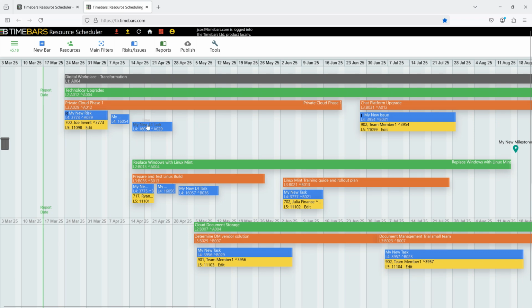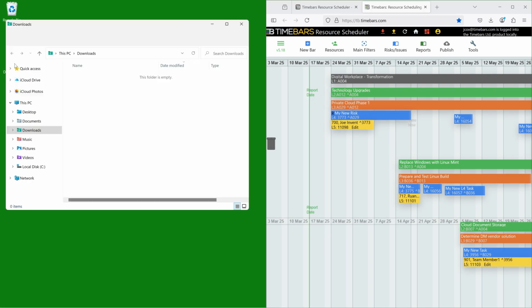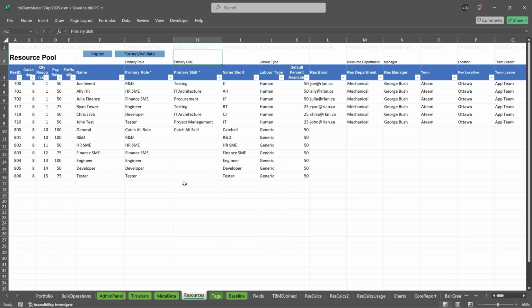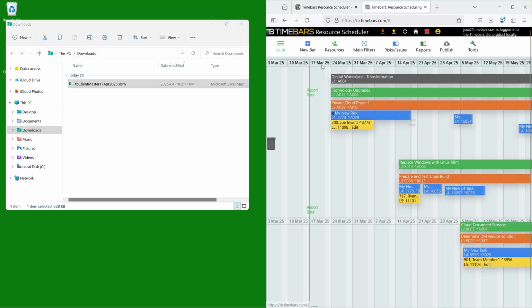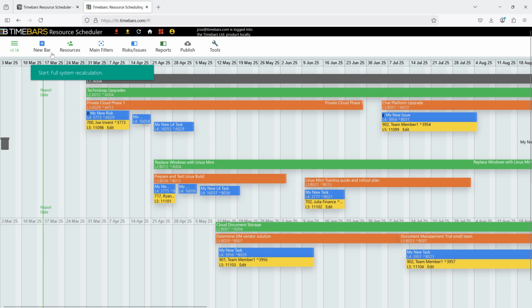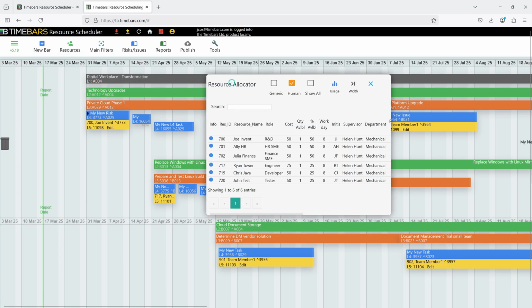Yeah, avoid the weeds. And right from the start, Timebars seems interesting in how it sets up the foundation. So step one is setting up the resource pool and the metadata. The document says you download a spreadsheet template. There's a mention of a hamburger icon, those 3 lines. Standard menu thing. You fill out a resources tab: IDs, names, roles, skills, rates, the usual info. All the key resource data. And then, this sounds neat, you just drag and drop that file onto the canvas. That must be the main visual area. Seems like it. And that action creates your centralized resource pool. Which sounds like a big deal, having everything in one place.